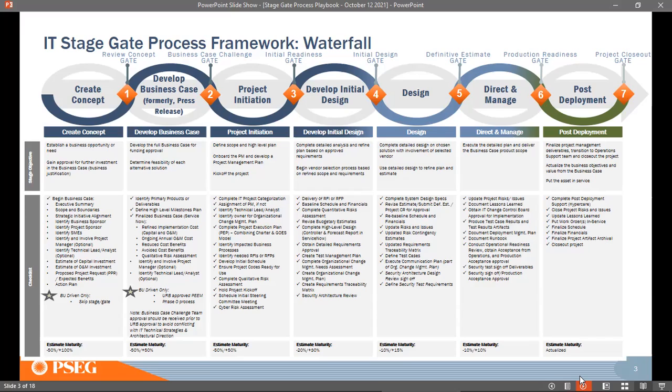So you have to think through various types of testing: unit testing, performance testing, system integration testing, penetration testing, then culminating into UAT, right? Define the test scripts properly. All those things will be happening in this stage. Once this is all done, you do your production acceptance procedure, and then present it to change management.